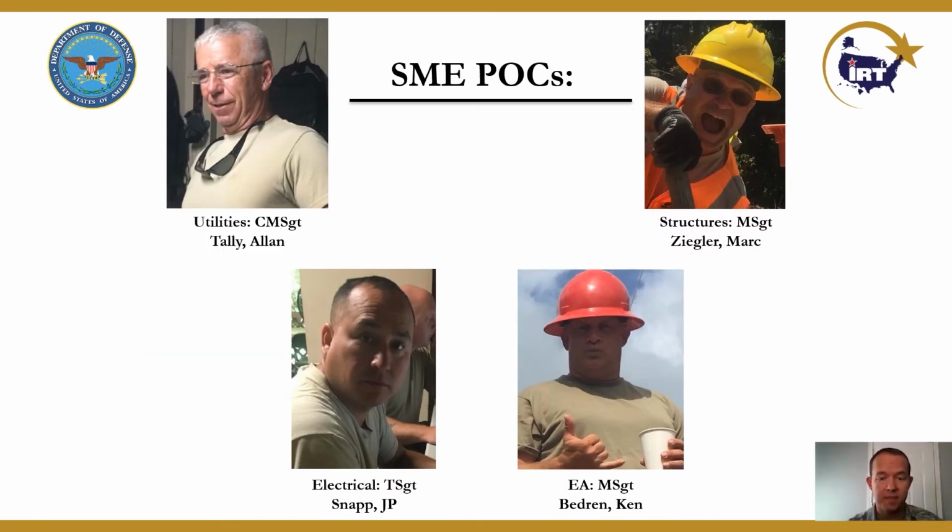Also, SMEs, we talked about that a little bit before. For example, the electrical SME: in these IRT projects, each state's different, so we've got to operate to the laws and building codes in those states. The building codes in Hawaii are different than building codes in California, which are different than Maine, which are different than Florida. We have people coming from all over the country to these areas, and we've got to maintain some continuity, which is why we have some duration staff subject matter experts.